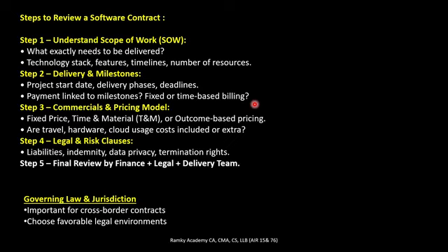Once the deliverables are achieved, the commercial and pricing model should be defined in the contract, whether it is fixed price, time and material, or outcome-based pricing. Travel, hardware, or cloud usage, all the extra costs should be included in the commercial section.